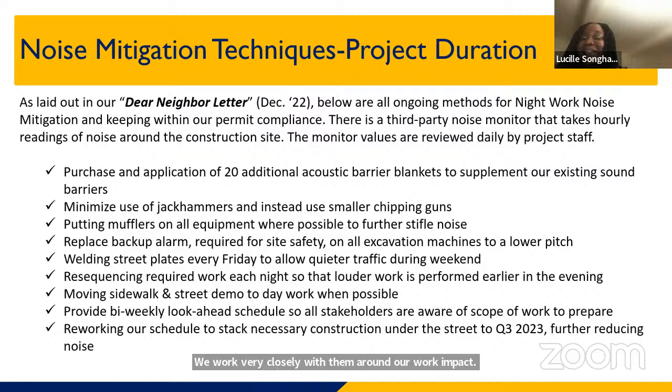So I think the biggest complaint that we hear primarily from shareholders at Imperial House has to do with the noise. And as Joe talked about, we are constrained by our permits to do work in the overnight hours, particularly around Lexington Avenue. Our folks are out there during the day, and so we are doing work during the day, but for the major utility work, all of that has to be done in the overnight hours.